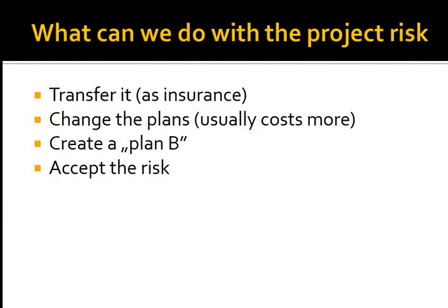So, what can we do with our risk if we want to deal with it? So there are several possibilities. First of all, transfer it. So if it doesn't cost too much, just buy an insurance. We can change the plans if we can say that the other plan is going to be better, or we can have our plan B in case of some risky factors coming into play, or we can accept the risk.